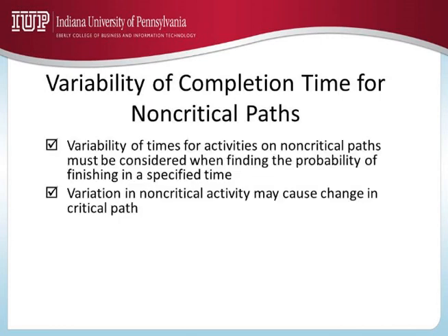The final thing is you don't want to be too carried away, because the non-critical activities also have a variability. We are not taking that into account here. We are taking into account just the variability of the critical activities. I don't want to get into more details, but from a practical perspective, you want to be careful, or you want to be conscious about the non-critical activities and the non-critical paths and their variability.